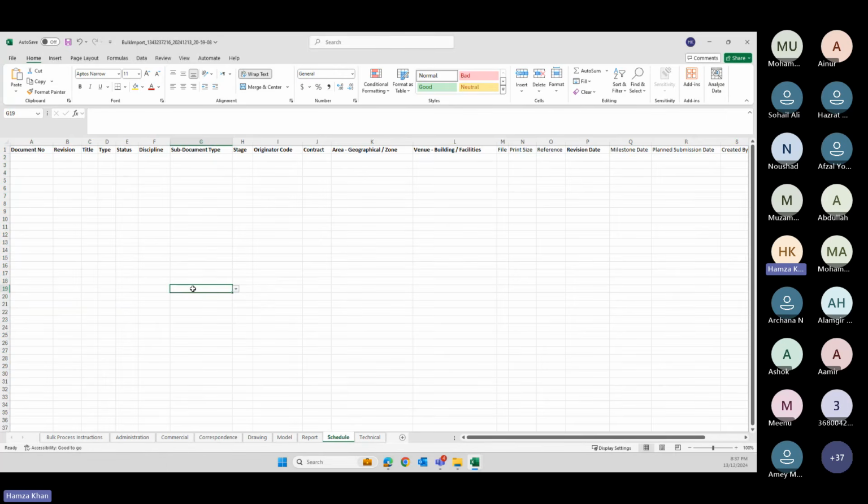register, and then it will see what is the revision number. If your revision number has exceeded what is already in your document register, then it will say, okay, this has to be changed and a new file has to come on top of it. Now, this thing which is going on right now, changing an existing file to a new file, that is your bulk supersede.